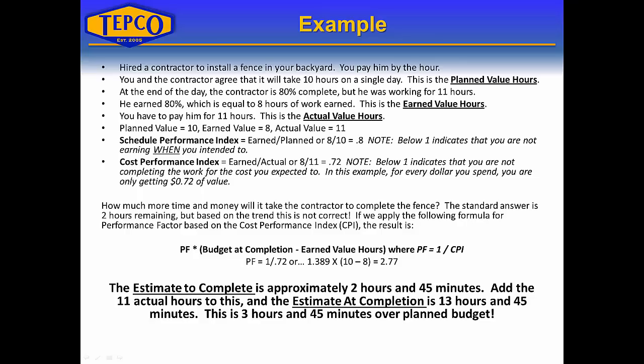So the planned value equals 10, the earned value equals 8, and the actual value equals 11. The schedule performance index (SPI) is earned divided by planned — in this case 8 divided by 10 equals 0.8. Anything below 1 indicates you are not earning when you intended to. The cost performance index (CPI) is earned divided by actual — 8 divided by 11 equals 0.72. Below 1 means you are not completing the work for the costs you expected, so for every dollar spent, we're only getting 0.72 of value.